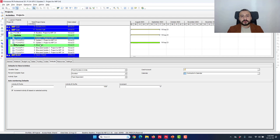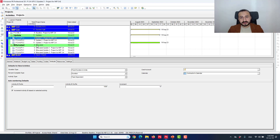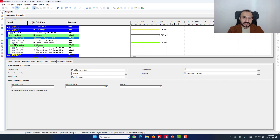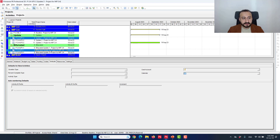You're going to follow the same process as 3.3 — the one I showed you before in another video. You fill the table and you identify any critical path shift, so it's going to be the same process. The only difference is we use a different schedule for the end of period. In the bifurcated method or the 3.4, I'm going to compare update number one to bifurcated update number two.